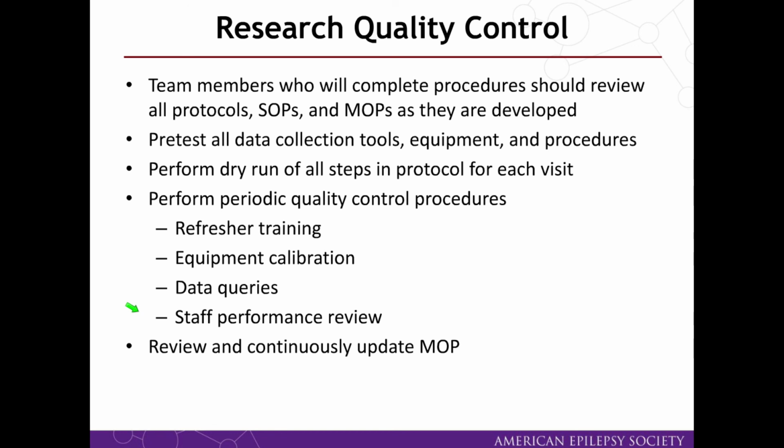So all of these documents help you to maintain the quality of your research project. So the team members who are involved in your study should review all of the protocols and standard operating procedures and MOPs as they're developed. You should test all of your case report forms and equipment and procedures and do some dry runs to make sure that you work out all of the kinks before you finalize your documentation.